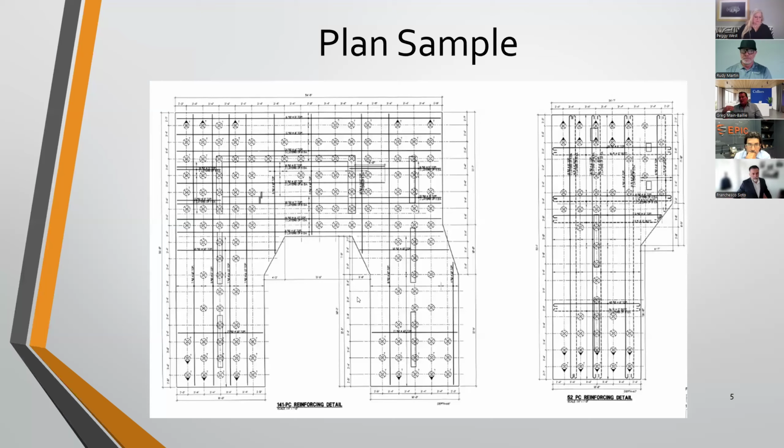And then subsequently, once they have been answered, typically your owner's rep and engineer are sitting down with each individual contractor for about a day to go through every single line item and understand what they have maybe missed or overexaggerated, because ideally you want that contractor to be successful, right?